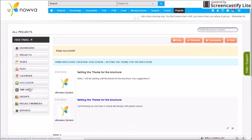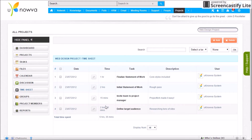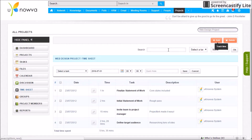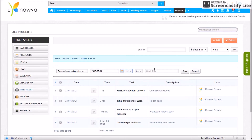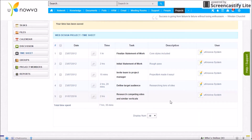Timesheets map the amount of time any member has spent on a particular task. You can see tasks assigned to a user and how much time they've spent — for example, one hour on one task, two hours on another. This helps track time usage per task and indicates user efficiency and time planning. To add a new timesheet, click Add, select a task, enter the date, the time spent, a quick note if needed, and hit Save. The time is then saved and shown in the timesheet list.